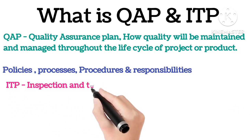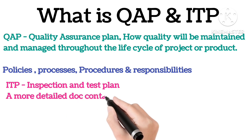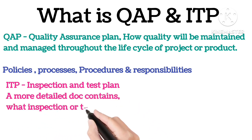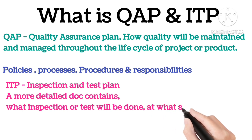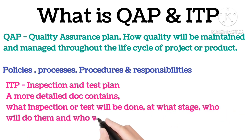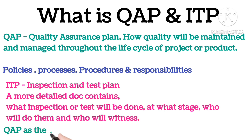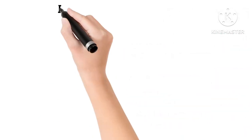ITP — Inspection and Test Plan. An ITP is more detailed. It's a structured document that defines what inspections or tests will be done, at what stage, who will do them and who will witness. It's basically the roadmap of quality control. You can think of QAP as the strategy and ITP as the execution plan.